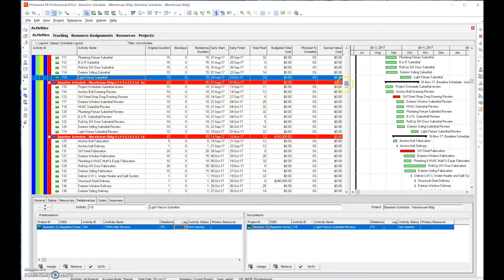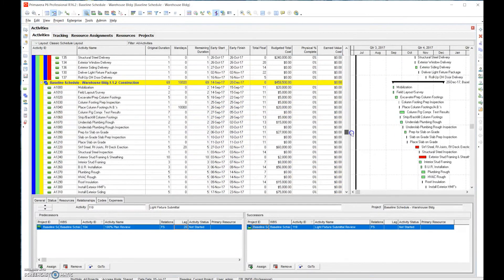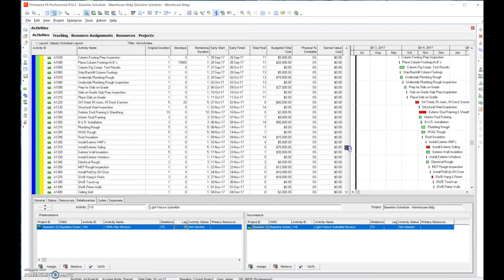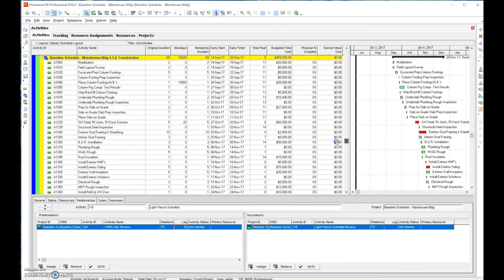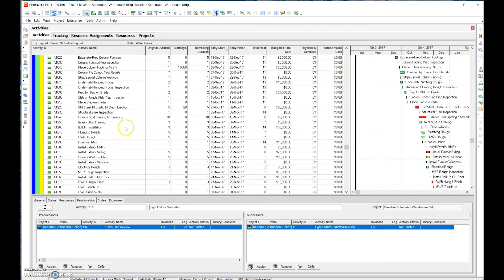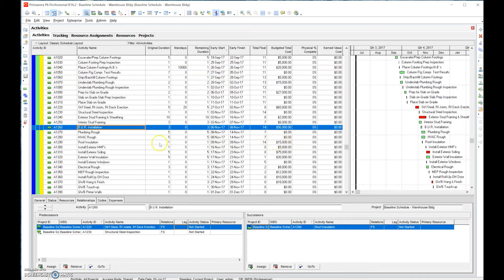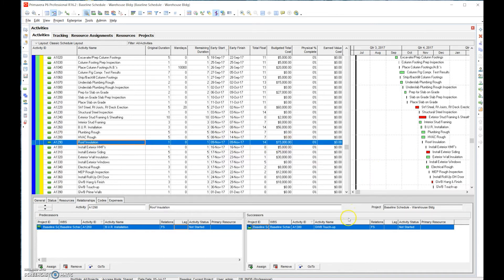For construction activities, we want to push pre-construction activities — we want to get submittals done as soon as possible, so there will naturally be more float there. Looking at a construction activity example, roof insulation has 14 days of excess float. Its only successor is 'touch-up,' which doesn't make a lot of sense logically.